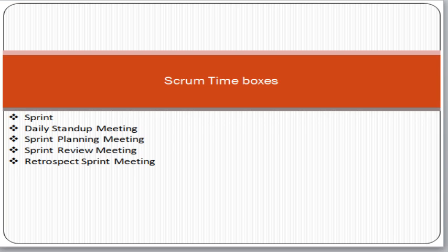Product backlog is the complete requirement of a project. So each sprint will contain 10 tasks, and for each sprint you plan, develop, test and then deploy. Then in sprint 2 you take 10 tasks again and plan, develop, test and deploy. Then sprint 3, then sprint 4, until you reach sprint 4. There are a total of 40 tasks, so you can deliver all the tasks to the customer.